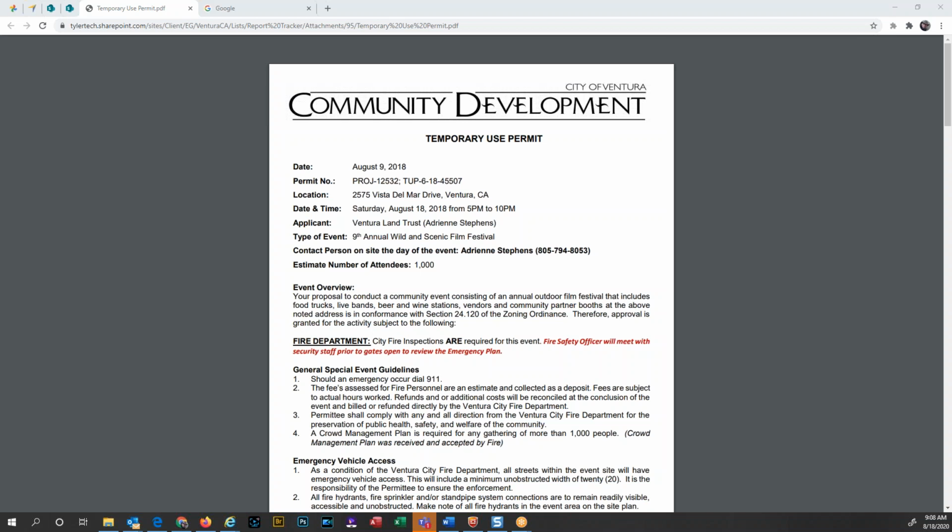You've given me the way to explain this, right? If CSS was in the picture from the beginning, we would have built the whole thing from beginning to end and validated and tested it end to end from the start. We got nearly to the end of the system without CSS, built, validated, and nearly tested, and then bolted on the last piece. Now it precludes us from easily making adjustments at the beginning, right? Correct. Unfortunately. We would have seen these things earlier, and there would have been a tweak under the hood earlier. I get it.